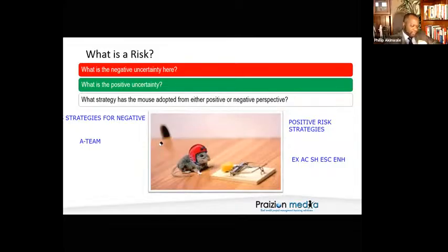Acceptance can be either active or passive for positive. It says the most active acceptance strategy is to establish a contingency reserve. Do you see why, when I said contingency plan or whatever, it falls into accept? Bear that in mind. Including amounts of time. So saying, oh, I'll put aside some time to deal with it, or I'll put aside some money or resources, it is all accept. Do not be deceived into thinking it's mitigate. It's a cheap trick. It's been a cheap trick for many years to deceive students that putting aside more resources or money if the risk occurs.